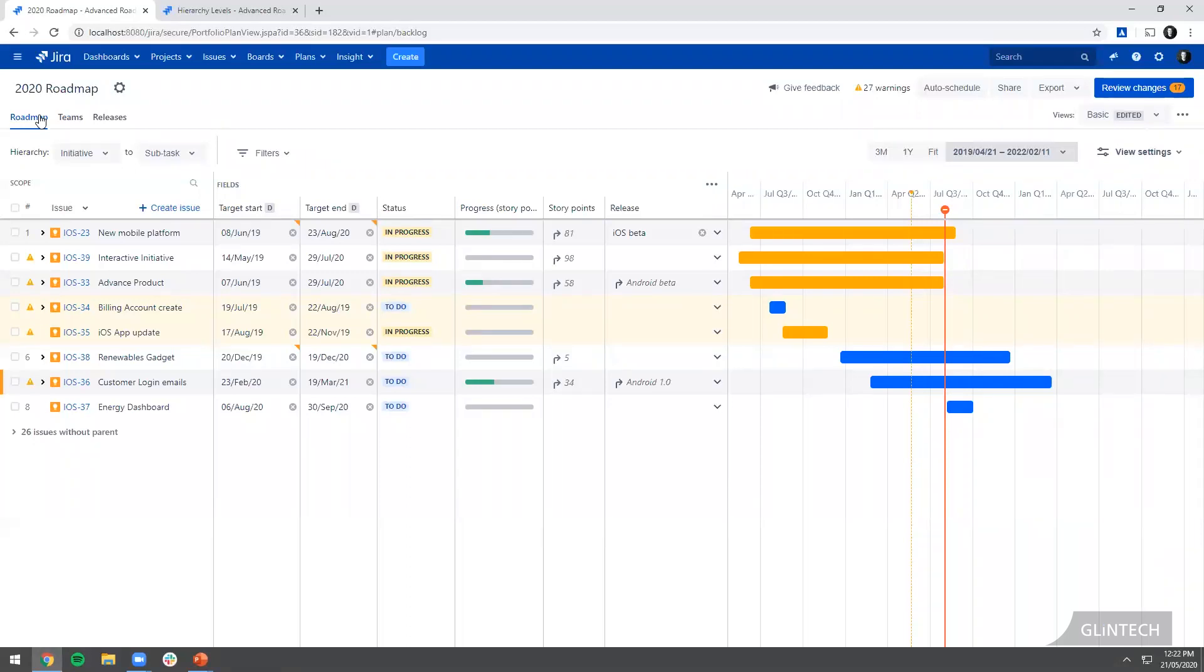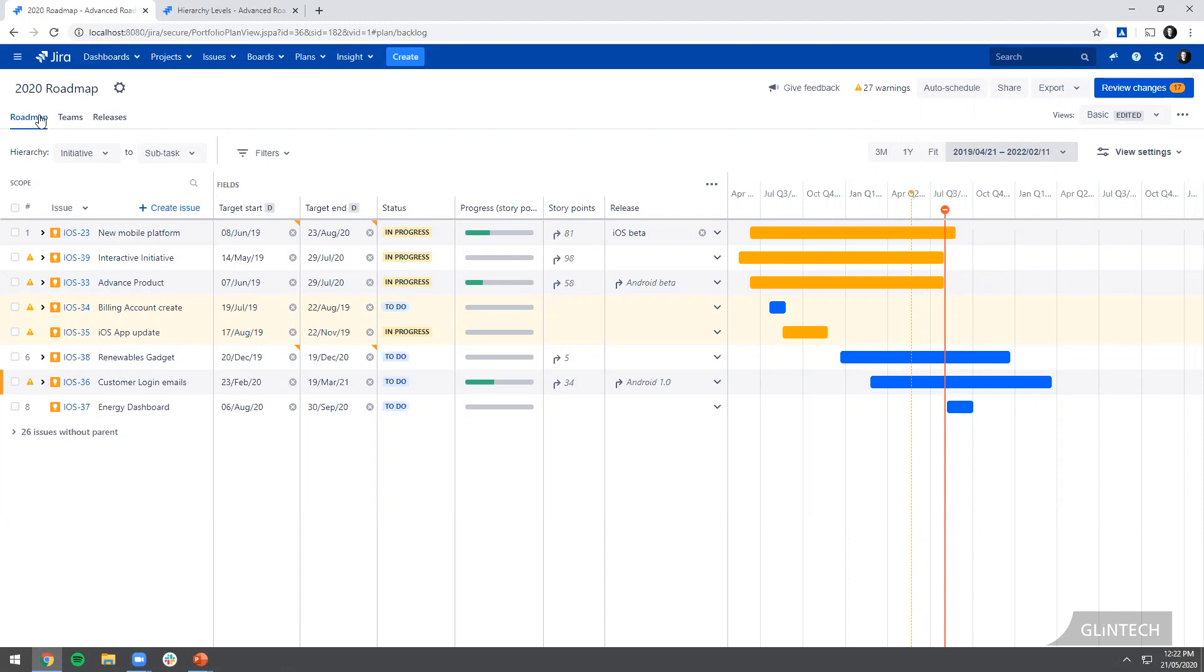I might see in three months time all the work that we currently have assigned to that particular release, we haven't got the capacity to get it done unless we go and tweak things. It's those levers, that iron triangle I'm talking about again, where you can say maybe I'll put some more people on it or maybe we'll de-scope or we'll change the order of things because the dependencies are playing havoc with the release date. That allows you to have those better conversations earlier on.